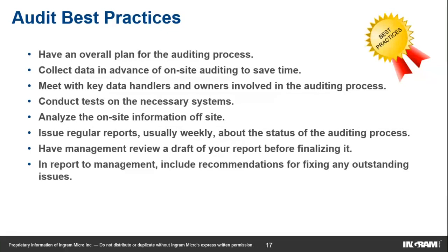You need to follow it up. If in a risk register a risk is accepted only for 6 months, after 6 months it is supposed to be closed or readdressed to see what its status is. Are we planning to fix it? Why have we not fixed it? We need to understand the root cause, so that we can decide whether it is okay to extend the risk. A risk which is low today can become high tomorrow, so it is very important to review the risk register as well.